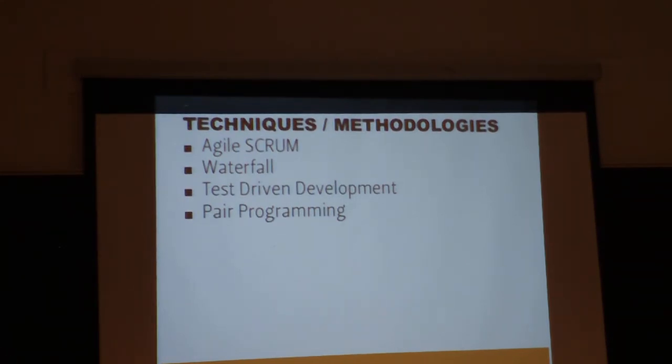I'm sure there's plenty of other techniques. Has anyone come across any other methodologies that they use currently? We're using Kanban. What's that? So it's basically swim lanes on a board. Oh, yes. And you just pull stories in and you have limits for how many stories you can have in test or in progress. And it's review. Similar to Agile? Yeah, it's a little more, even more lenient than Agile.